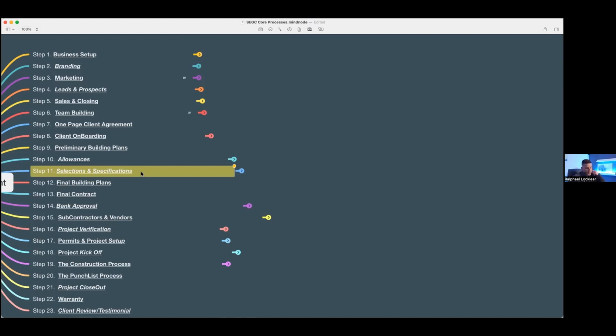And they go to pick out the fixtures right before the electricians are ready to get it installed, and the builder's on them saying, well, hey, we need to get these fixtures picked out. They give a spec on fixtures, and now when he adds up the bill, it's triple what they had settled on with the allowances. Who's at fault in that situation? They both are, in all honesty, right? But most builders just want to do a good job, and they let the clients lead them way too much.